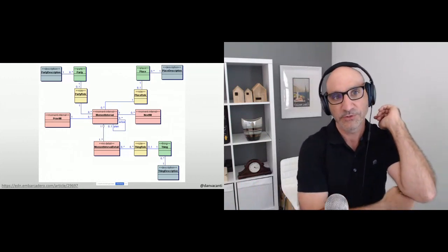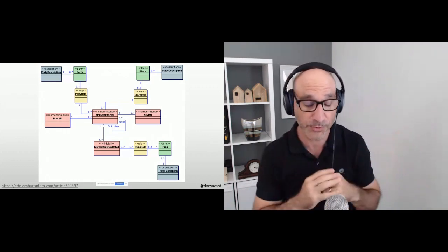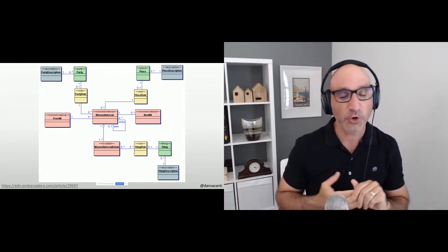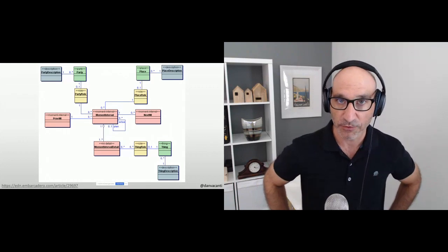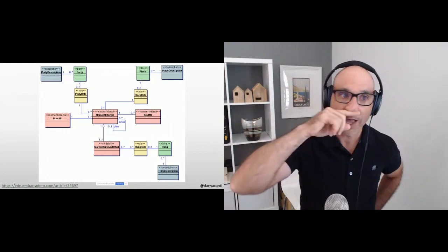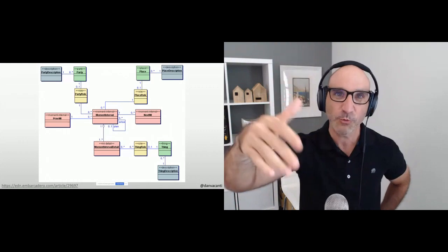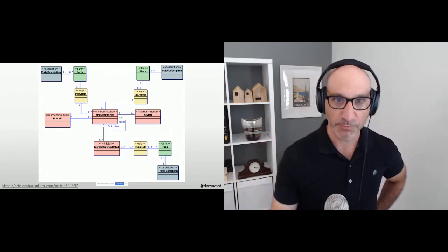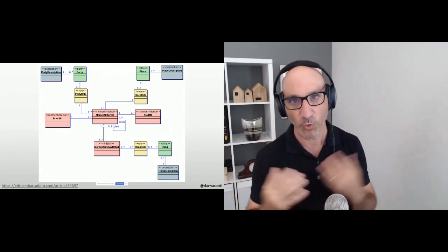What is important to know is the power of the visualization of color modeling, and using color as one of those dimensions to communicate that visualization. Kurt Kwame happened to be in that color modeling class, and he was also on the Sustainment team. So at that point, Kurt put his hand up and said, well, if we're struggling with what we're going to visualize and how to visualize it, why don't we just take a whiteboard and put colored Post-it notes up on it, and we'll use that to manage our work. And that is exactly what they did.